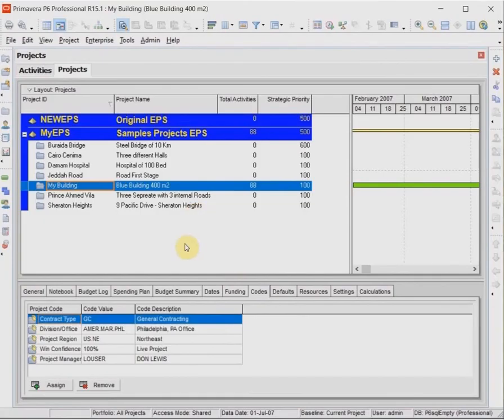The next feature of the Magic tool will enable you to compare the file before importing it into Primavera with the same file after exporting it from Primavera, to ensure that all added and modified data has been entered as required. Before exporting the file from Primavera, don't forget to refresh data. And in the case of large projects, it's best to wait some time to make sure that all data has been written to the database, and it's preferable to refresh data several times before exporting the file from Primavera.